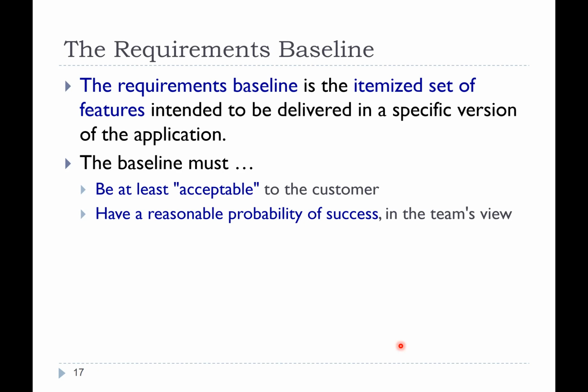Okay. If I didn't get around to the whole parking thing, if I didn't get around to this whole Moodle thing, payroll thing, fine. At least I have something that is actually usable. I can package it, right? Put the sticky tape around it, and I can submit it. That it is something that is actually useful. And this will be in agreement with the customer saying, if we run out of time and money, this might be what we actually end up delivering.